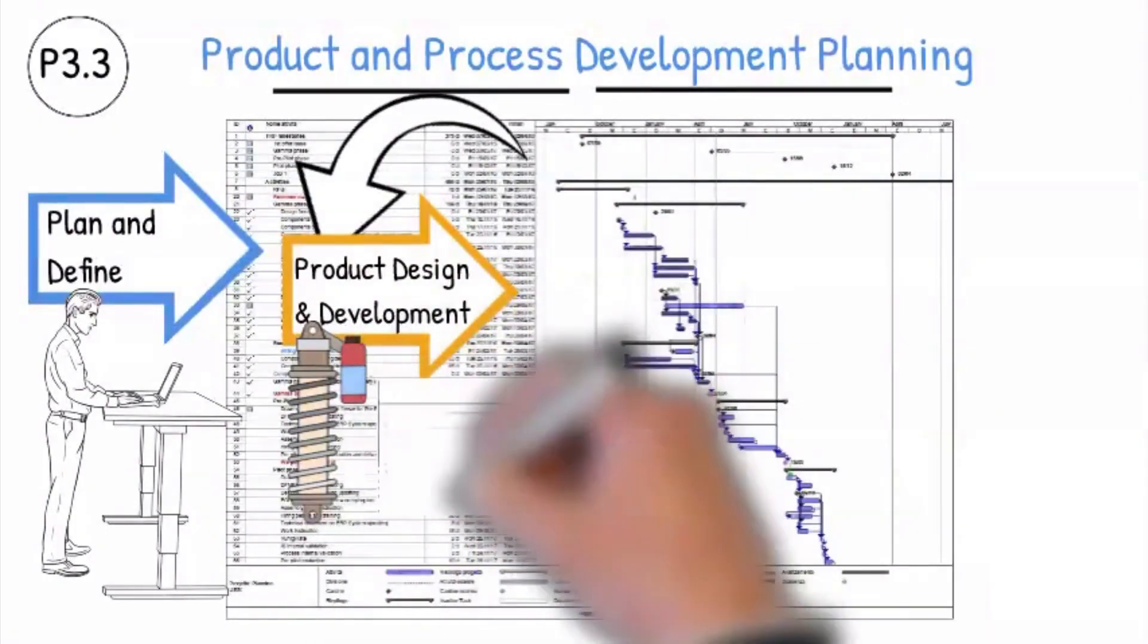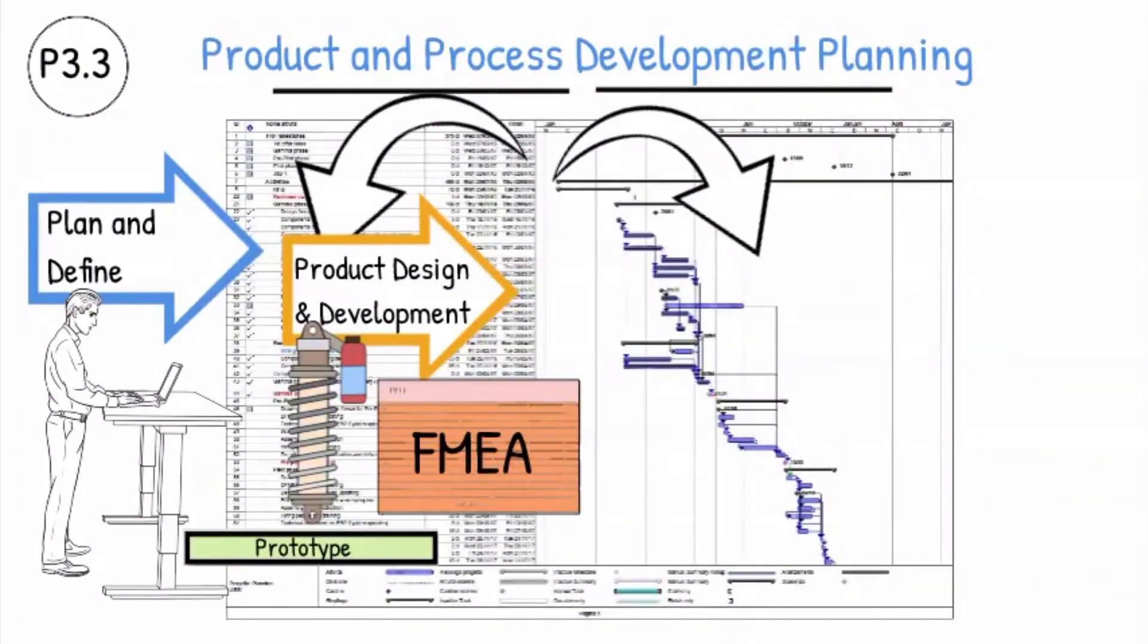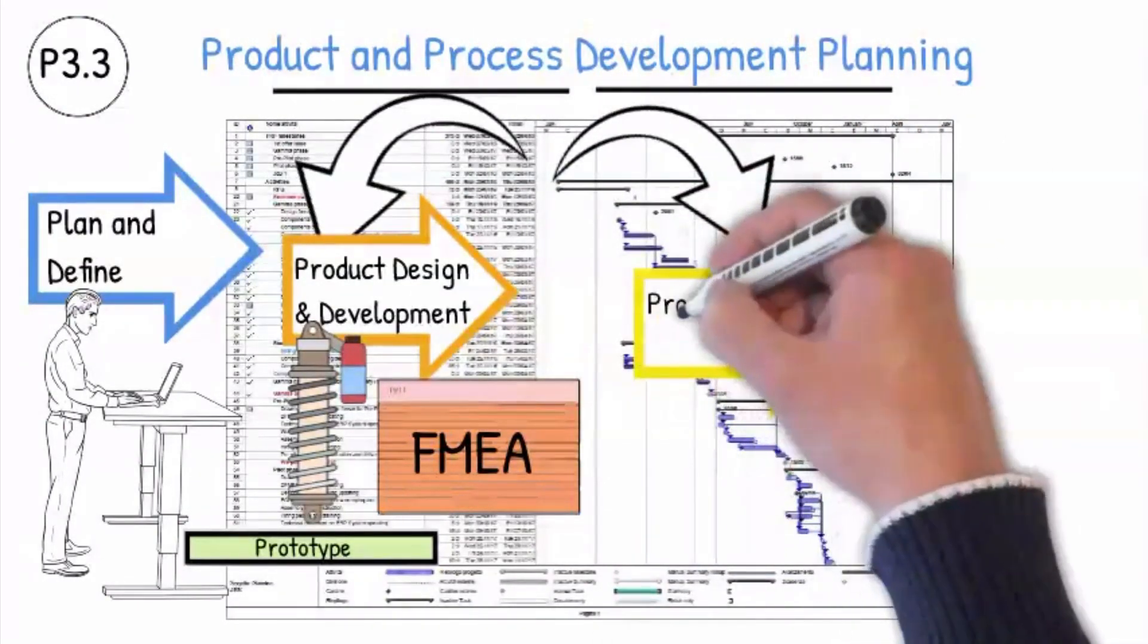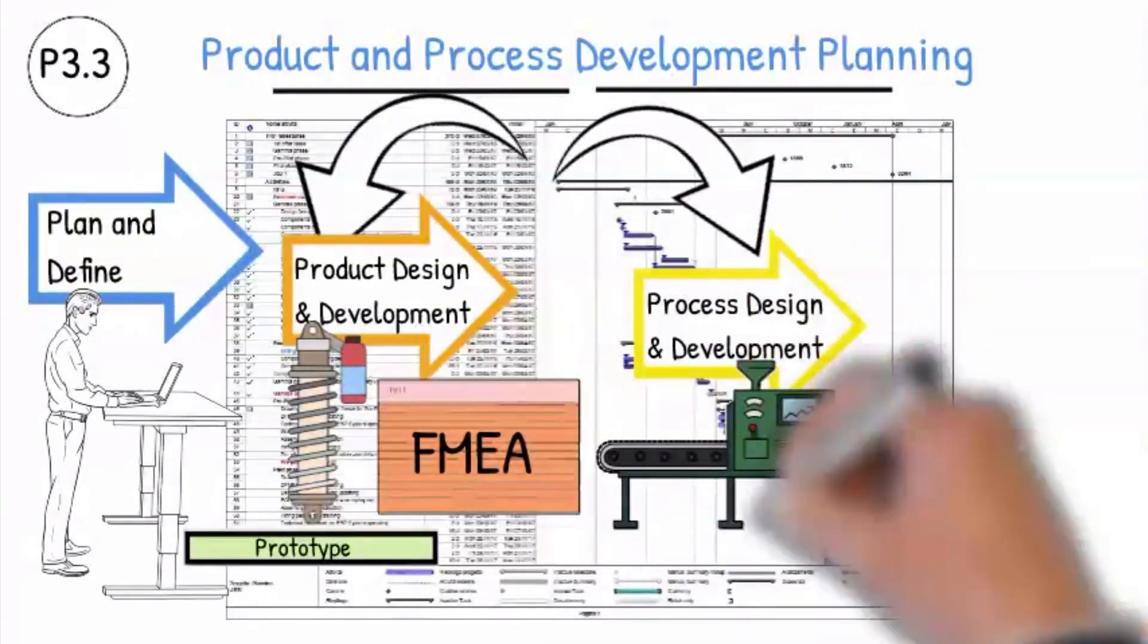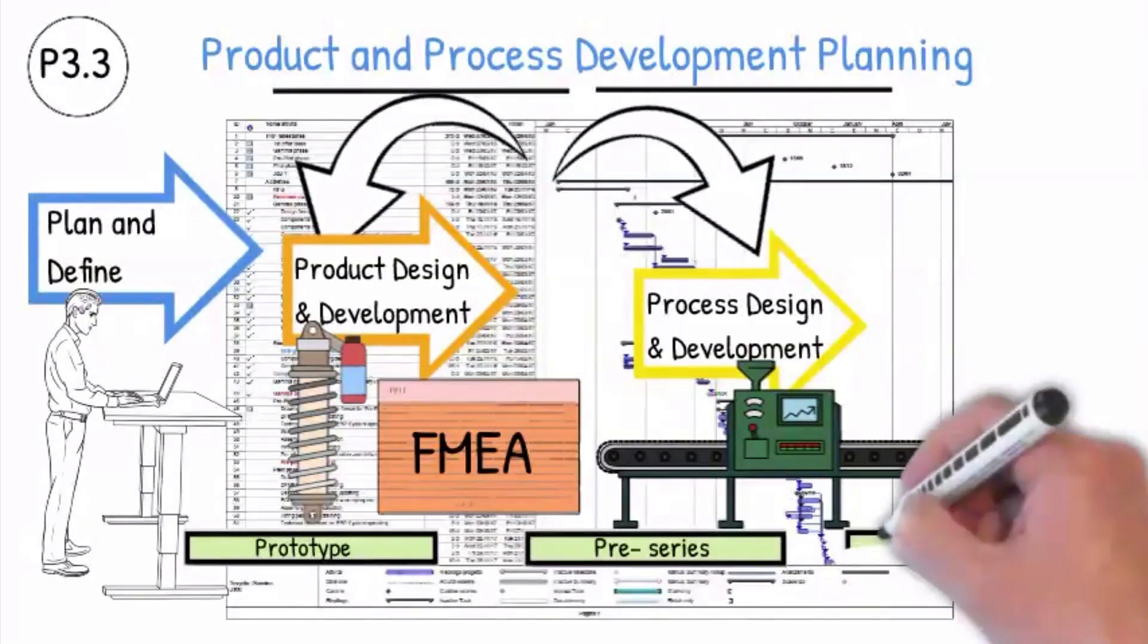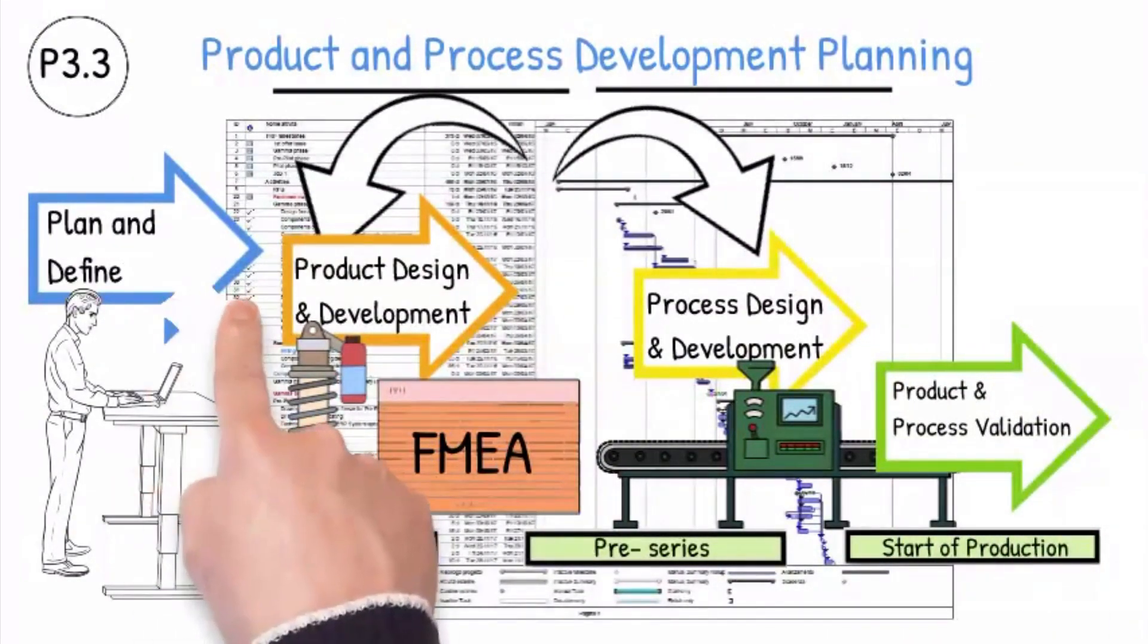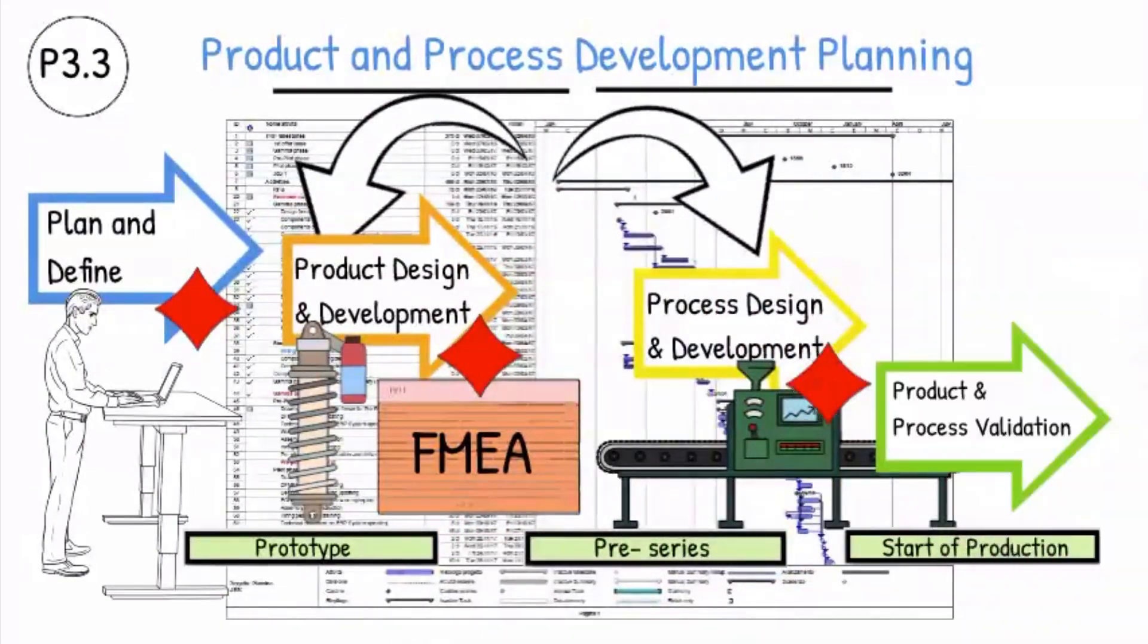Risk analysis, product FMEA and process FMEA or similar methods are part of the planning. At the planning stage, the development of new products and processes should take into account the requirements of the product operational conditions. The time schedules contain all information for product and process development including deadlines and length of time, milestones within the overall project plan, performance testing.